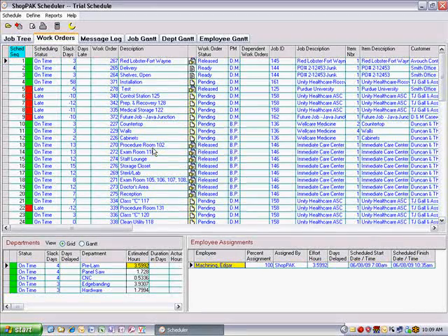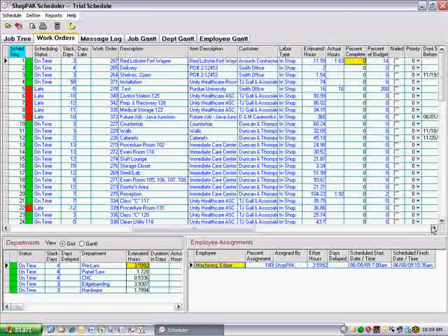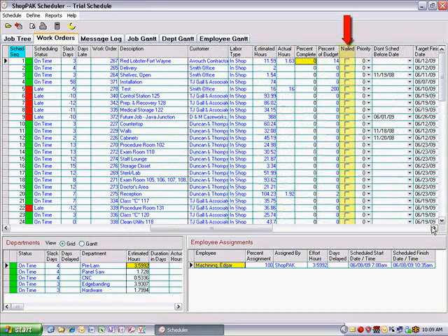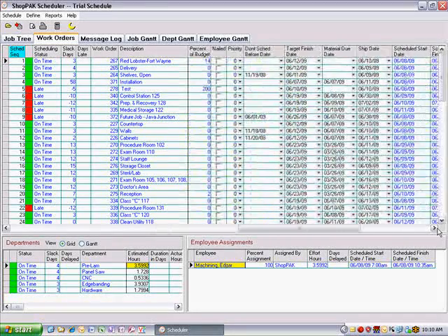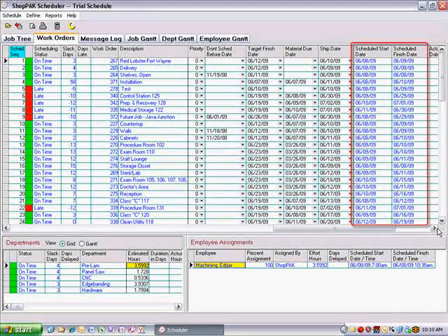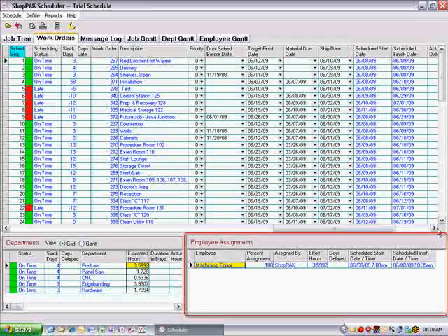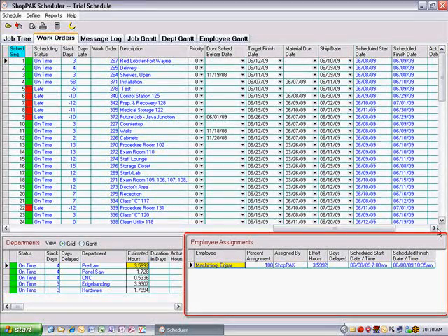Another key scheduling directive is whether or not a work order is nailed. Work orders that are not nailed get rescheduled every time you run the scheduler. They get scheduled one after the other based on their position in the scheduling queue. Thus, unnailed work orders may get a new scheduled start and scheduled finish date when you run the scheduler, and they may get new resource assignments based on the scheduling directives that exist when the scheduler is run.